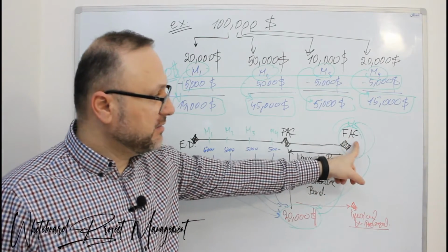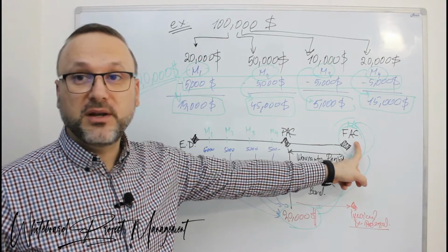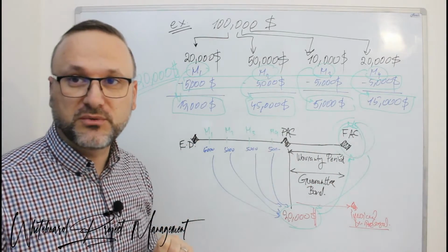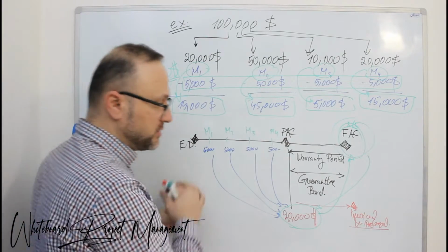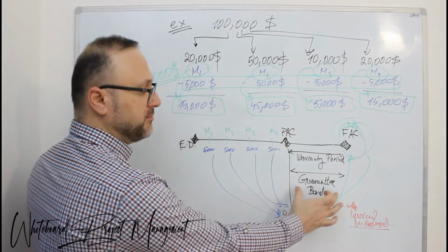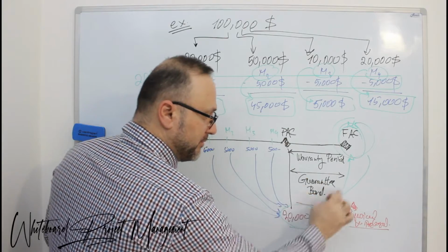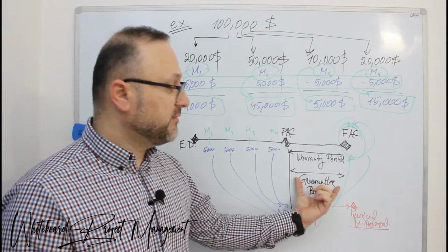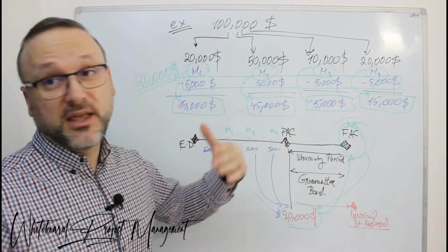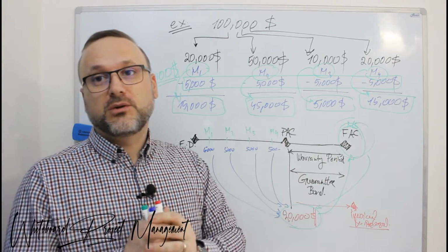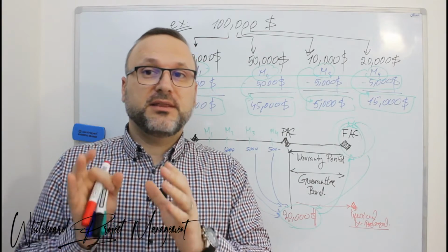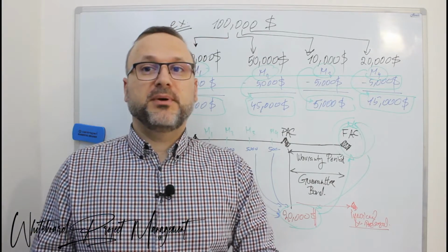So that's why the client says, okay, I will leave one payment milestone over here, or I will deduct from you this percentage from each milestone. Otherwise, the contractor can issue a guarantee bond, and the guarantee bond will cover this period while the contractor's bank is guaranteeing that the contractor will prepare everything.